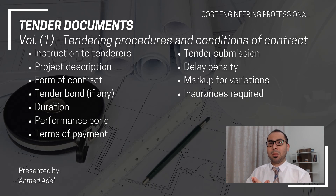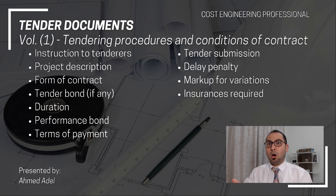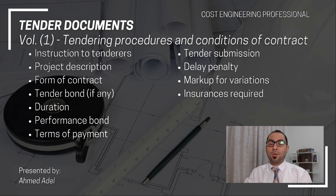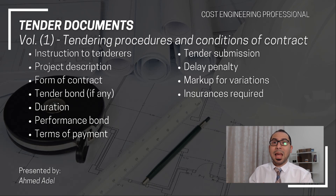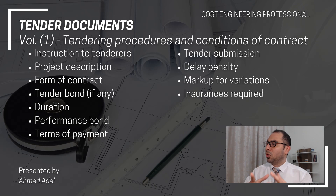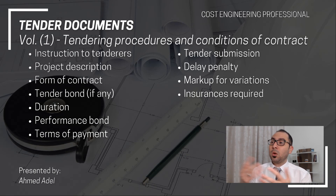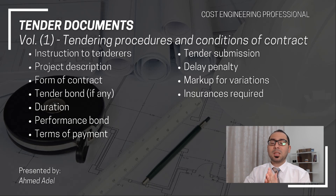Volume one also includes the tender bond, if any. Sometimes to guarantee the seriousness of your price, the client will ask you to submit some money or a bank guarantee before you submit your price, so that if your offer is selected you will be serious about executing the project. The details of the tender bond — whether it should be a bank guarantee, cash, or check — are all found in volume one. Additionally, project duration, performance bonds, terms of payment, how the tender submission should be, delay penalties, markups for variations, and insurances are all found in tendering procedures and conditions of contract.